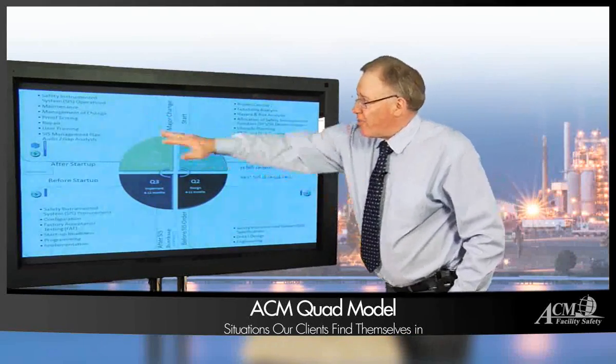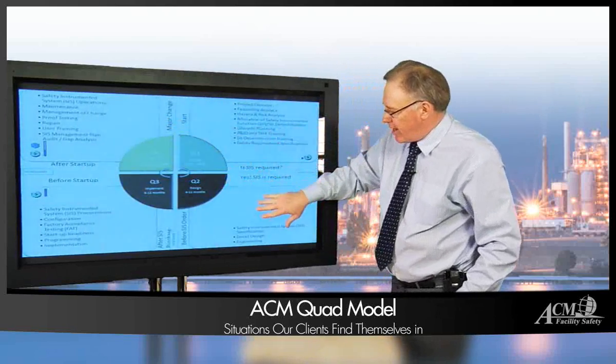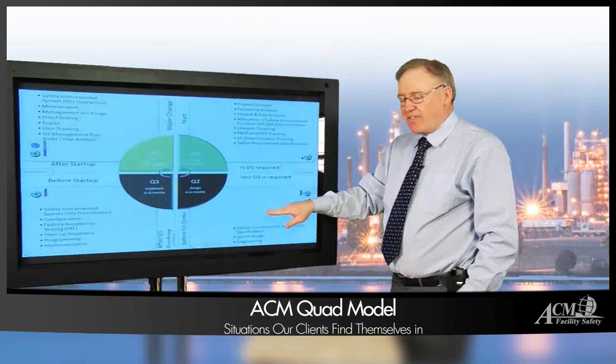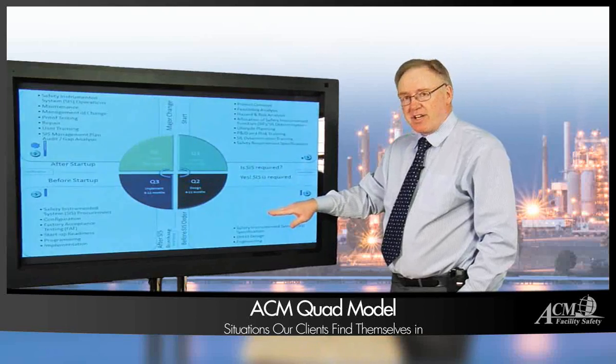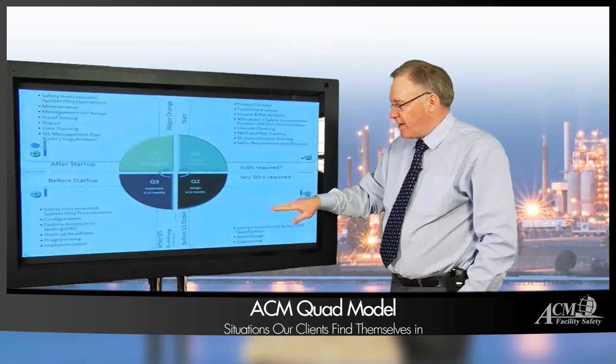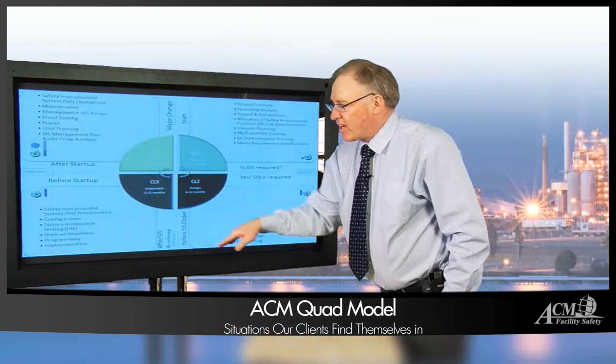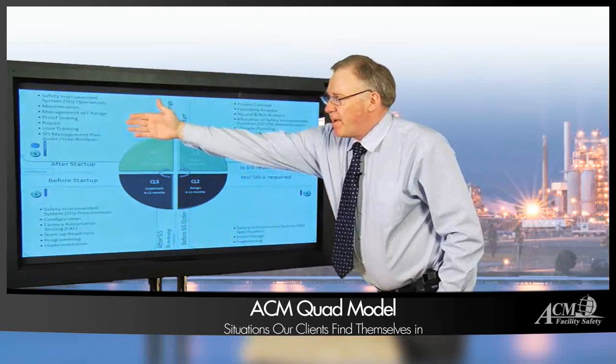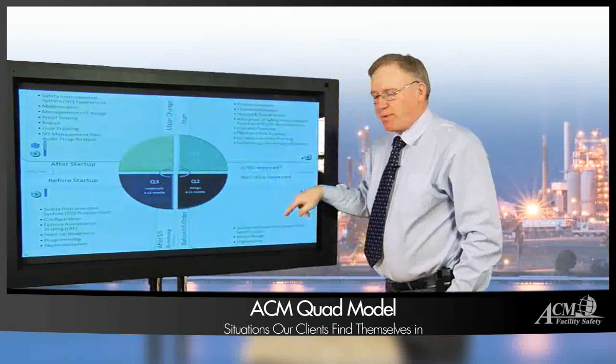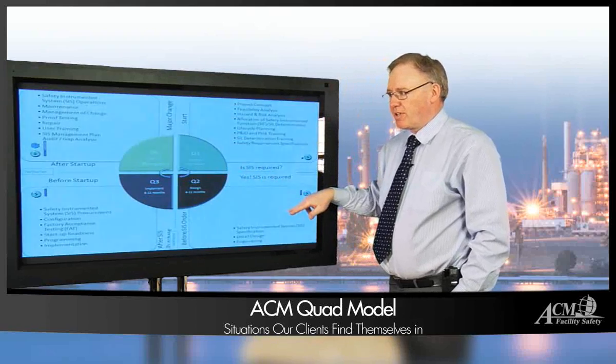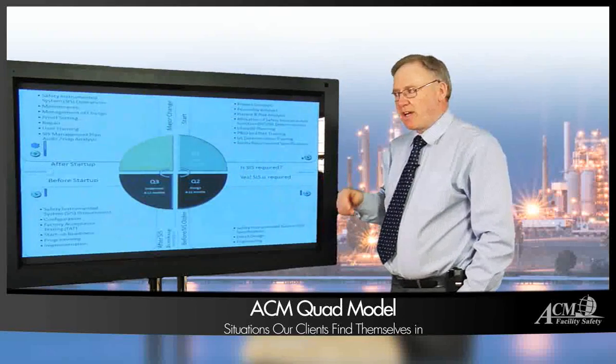And of course, everything that we check here is compared against the functional safety spec, that SRS spec that was designed here. So we designed the spec, someone else goes away and implements it, then we come back at the end of the day and check against the spec to make sure it was implemented as per the design. So it's a real QA step.